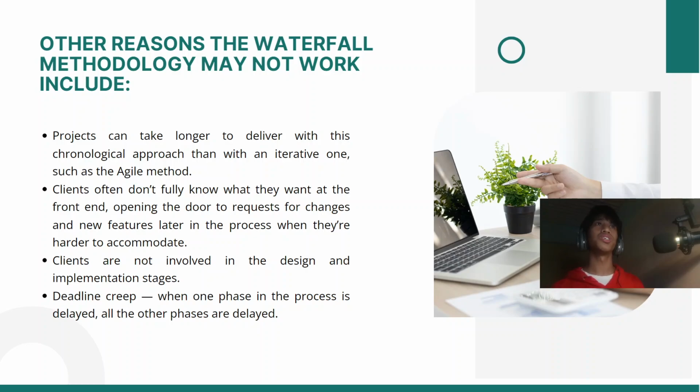So, what are the other reasons the waterfall methodology may not work? Projects can take longer to deliver with this chronological approach than with an iterative one such as the agile method. The second is clients often don't fully know what they want at the front, opening the door to requests for changes and new features later in the process when they are harder to accommodate. The third is clients are not involved in the design and implementation stages. And the fourth is deadline creep, meaning when one phase in the process is delayed, all of the other phases are also delayed.